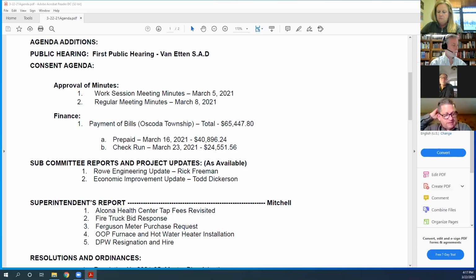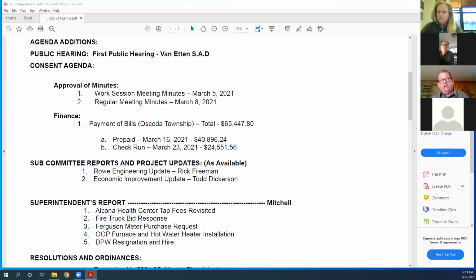The remaining phases, C, D, E, F, and the remaining portion of Phase H, will either be stretched out over the 4 remaining years of the DWRF application, 2022 through 2025, or if we're successful on the C2R2 grant application that we submitted, and we're hoping to hear on that any day now, we can move those up and schedule them appropriately. We don't want to throw everything at it at once, but the more projects out there, the better prices we will be able to get. So we'll hopefully see some result on that application shortly.